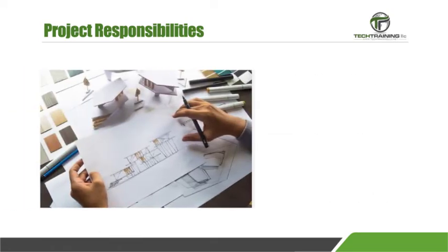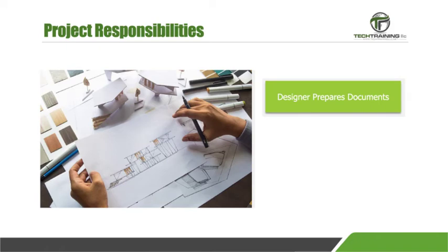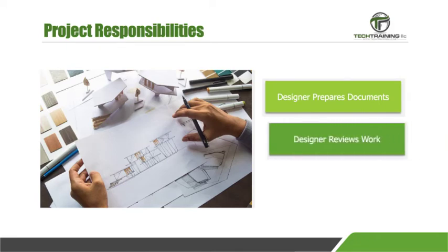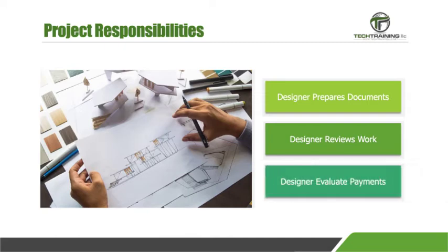The designer, in the traditional design bid build format, must prepare accurate contract documents for the bidding process. If the designer stays on as a consultant, they should be reviewing the quality of work and evaluating the progress payments. If the delivery method is design build, the design work packages become a key part of every step of the construction process. Therefore, the overall master schedule for the project should be linked directly to the timely submittals by the designer.